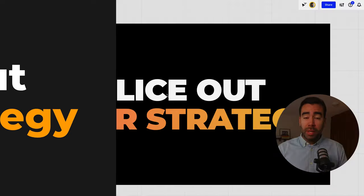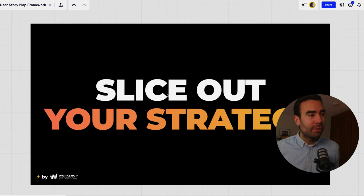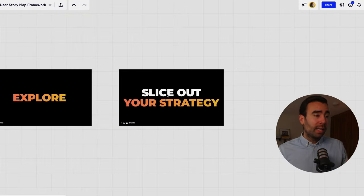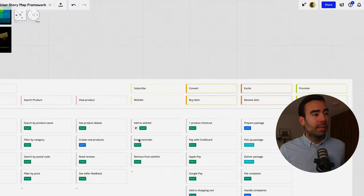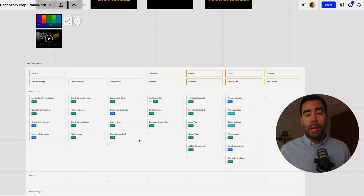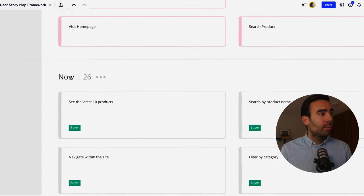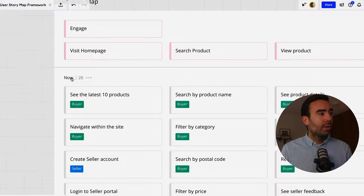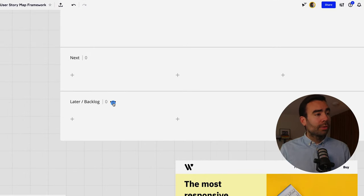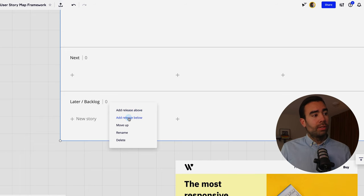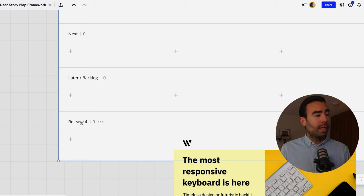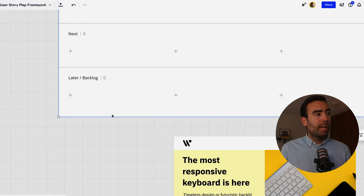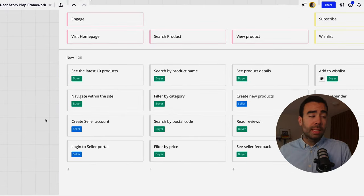Because the fourth and final step is to slice out your strategy because everything now is in the user story map and of course you cannot build everything at once so there needs to be some decisions about what are we going to do first and an easy way to do that is to make use of this sections so now next and later those are the labels I like to use in a user story map it's called a release so maybe you want to add another release then you could do so like this but for now let's start with now next later because most of the times that's sufficient.